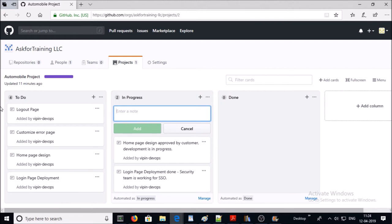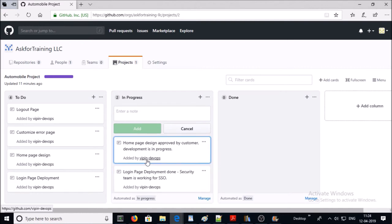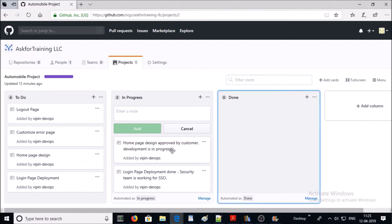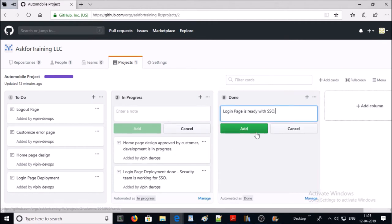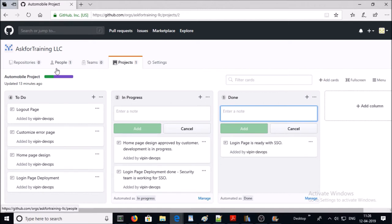We added two items in progress: login page deployment has been completed and the security team is currently working on single sign-on. Also, the home page design has been approved by the customer and deployment is in progress. If any item or task is completed, it moves to the Done column. For example, the security team completed single sign-on for the login page, so that task has been completed. You can see the overall progress of your project at the top: one Done, two In Progress, zero To Do.